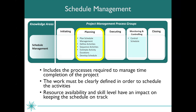You'll often hear these referred to as project phases, and one of the 10 knowledge areas focuses on schedule management. During the planning phase of a project, there are a lot of processes that should be completed in order to create your project schedule. They include plan schedule management, define activities, sequence activities, estimate activity durations, and develop the actual schedule.